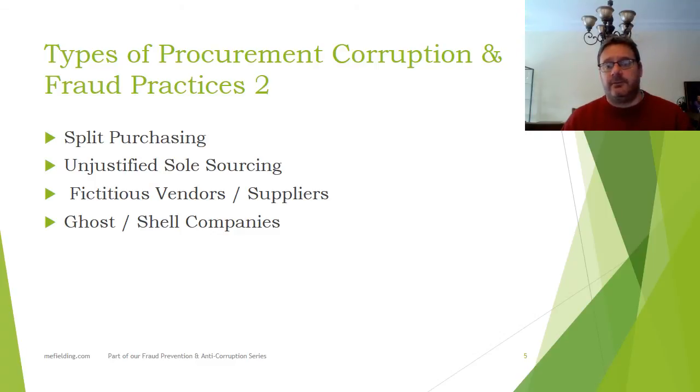In real life, you often do it because you have an LTA with a company, and they offer you a good product at a good price. And so the cost of going through a constant tendering process is greater than any cost savings you would make. So I worked in an organization where all of the computers came from Dell, everywhere in the world, and they just decided that it was so much quicker to sign a contract with Dell, and I'm sure they were giving a good price and good product, than it was for all of the offices to go through, well, will we buy an Apple, will we buy a blah, blah, blah.